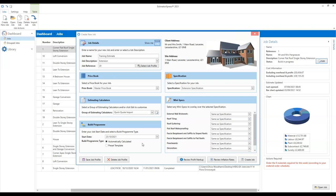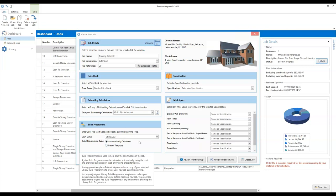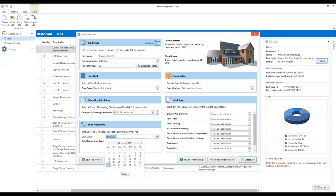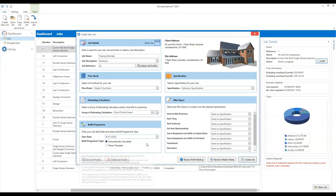The build program start date is really important for the Gantt chart and the build program itself. It also feeds dates into any data reports that use dates — things like material ordering schedules, profit forecasts, cash flow reports and so on. They will all make use of the dates that come from your build program, so you need to make sure it's accurate when you come to use those things. For now, we can just put an estimated start date — let's pick the 1st of November as an example.